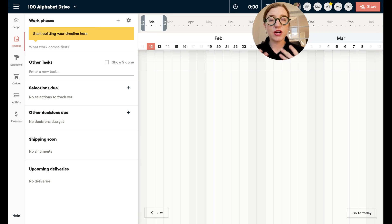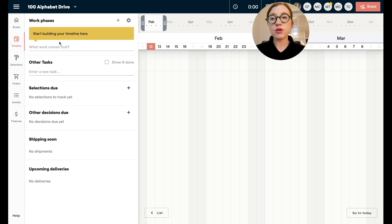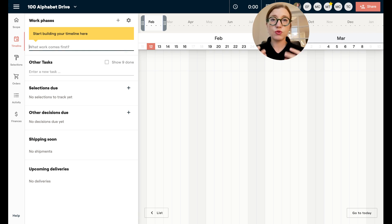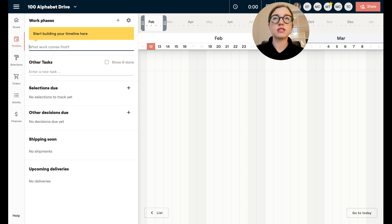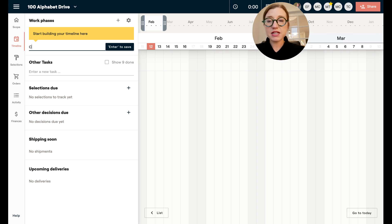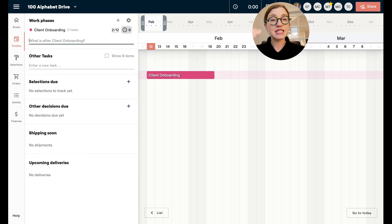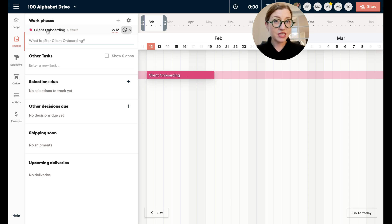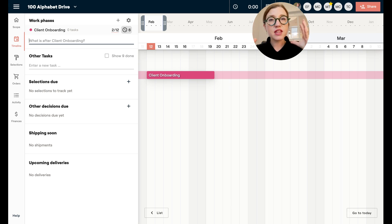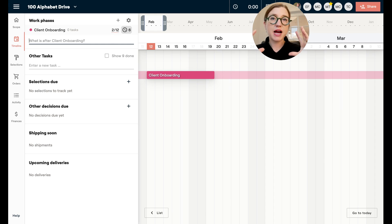When I'm ready to start outlining a project, the way I want to think about work phases is going to be phases that I'm going to use over and over again — larger chunks or milestones. For instance, I might start my first phase as client onboarding, because in client onboarding we're going to have specific tasks that we want to happen every time. In creating this timeline I'm also thinking about how I could possibly templatize this for later.